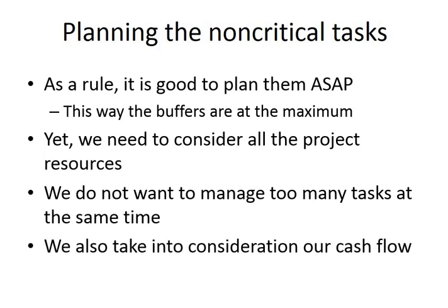And also, sometimes the decisive factor is money, which means that we would prefer to pay later than before. So we wouldn't try to complete everything as soon as possible, because we wouldn't like to pay for the resources we need to complete those uncritical paths. As you can see, if they are uncritical, even if we make them faster, it doesn't change the total length of the project. So it's up to our consideration.